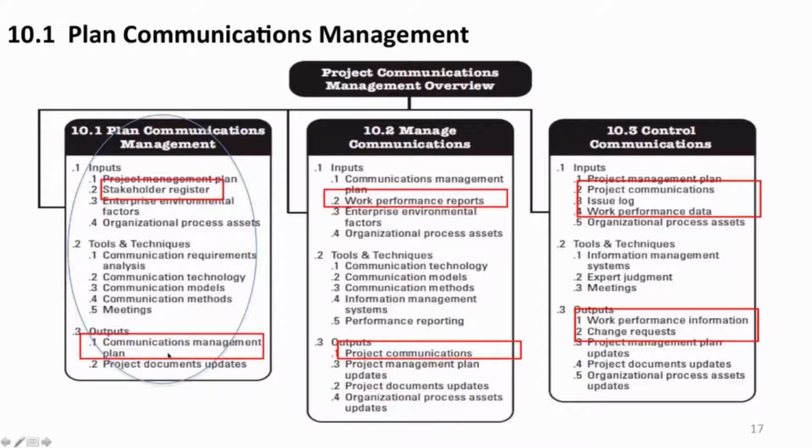because the stakeholders will tell you how they prefer to have their communications, what the content of their communications, what they don't care to see, and the format that they want to see things in. So that all comes from the stakeholder register and your interviews with stakeholders as you engage them, right, as you manage their expectations. And by the way, I don't want to belittle your communication with the project team at all, because they're certainly involved.